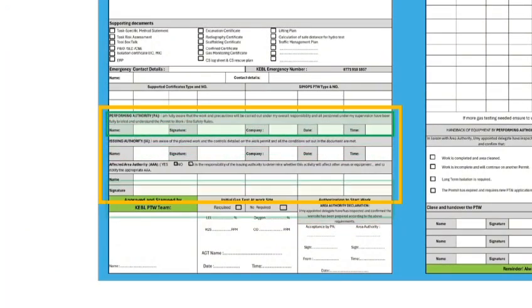If there is any affected area authority, the issue authority or IA must identify affected area authority, and the affected area authority signs for approval. After that the issue authority can sign and approve the permit. If there is no affected area authority then only the issue authority will sign.